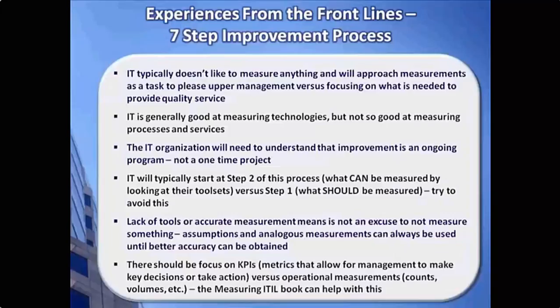If I go to management and say that my change effectiveness ratio is sitting at 95% or 98%, that sounds like a generally good picture. That means 95 to 98% of all changes that I wanted to make went successfully with no problem. If I go in and show management a number that says, let's say it's 42%, meaning only 42% of the changes we make go in successfully, that immediately tells management that they have a change management problem and that some action needs to be taken for them to fix it. So that's a good example of what a KPI can do from a management perspective.